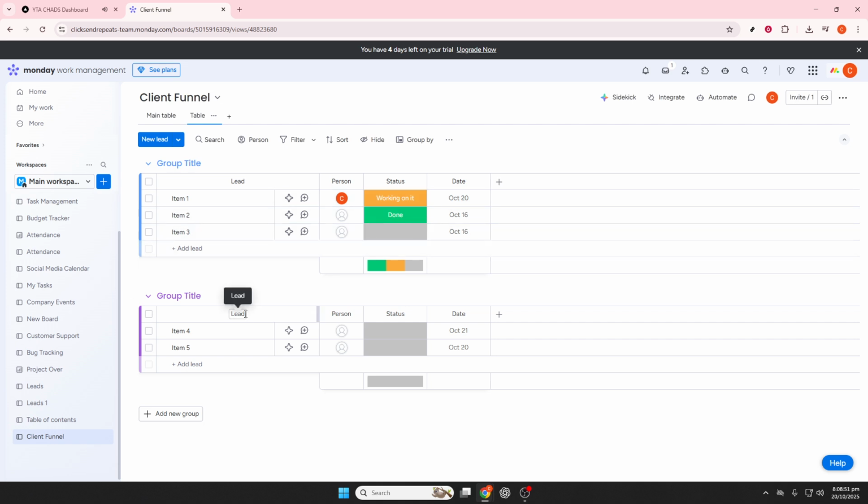Finally, consider combining multiple automations for an even smarter workflow. For example, you can automate your process so that when an item is created, the due date is set 5 days ahead, automatically adjusted as tasks progress, with timely notifications sent to team members. With this setup, your entire schedule operates smoothly and efficiently on autopilot.